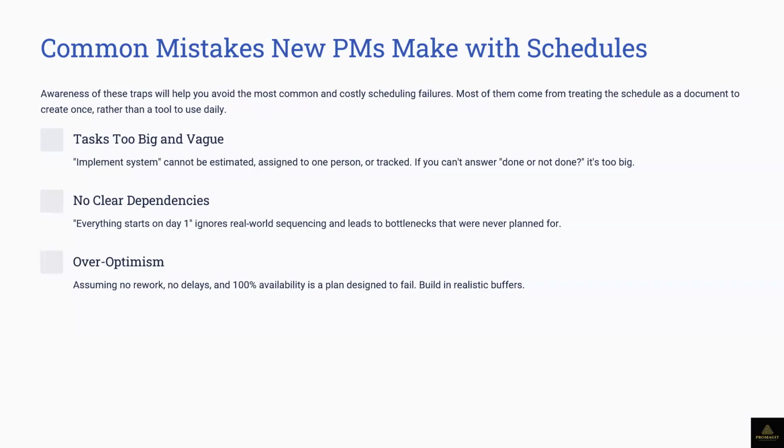Now, if we outsource it to other people, we look at the profit margin; it doesn't seem worth it. And we went back to the client and said we can't do this, and they took it away from us, and we're happy to lose it. You win some, you lose some. We could have outsourced it or brought more people in, but at the end of the day, when those people finish that project, and it's not a project that is so long, maybe 1.5 years, what happens after 1.5 years? Are we going to let these people go?